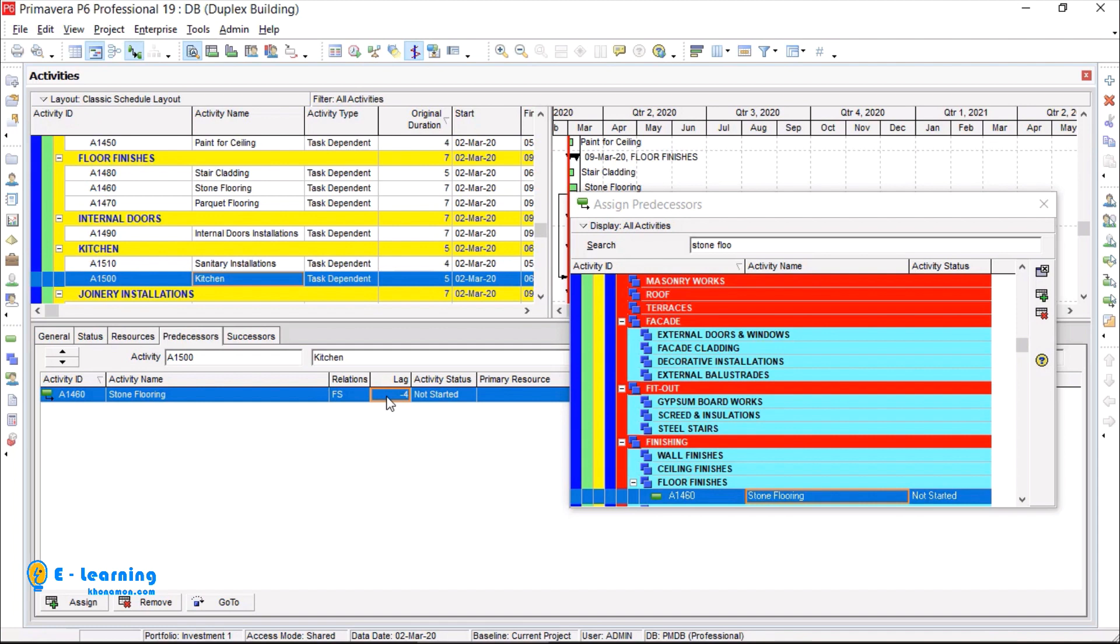Assign all activities from Excel file. Note that one activity can have more than one predecessor or successor.